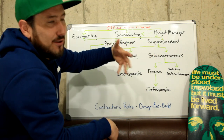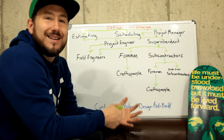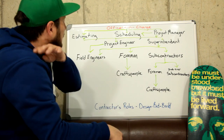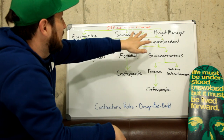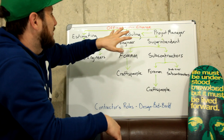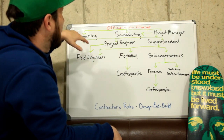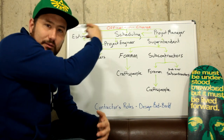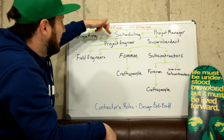A lot of times the theme is to have your estimators be the project managers of the projects they estimate, because they already have an intimate relationship with the people involved and the project itself. Scheduling is related to the officer in charge, the project manager, and scheduling. Estimating and scheduling do go hand in hand, because you need to know — on a scheduling basis — you can get your schedule days off of the takeoffs from the estimating. So a lot of stuff is automatically generated for scheduling.